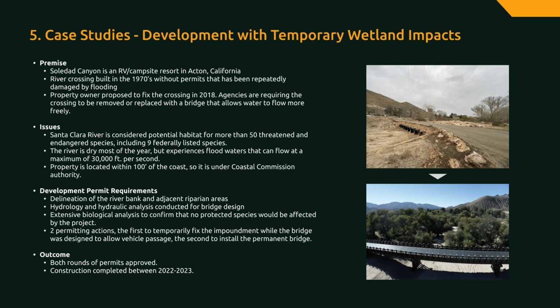We ended up with 2 permitting actions. The first, to temporarily fix the impoundment while the bridge was designed to allow for vehicle passage, and the second, to install the permanent bridge. Both rounds of permits were eventually approved and construction was completed between 2022 and 2023.